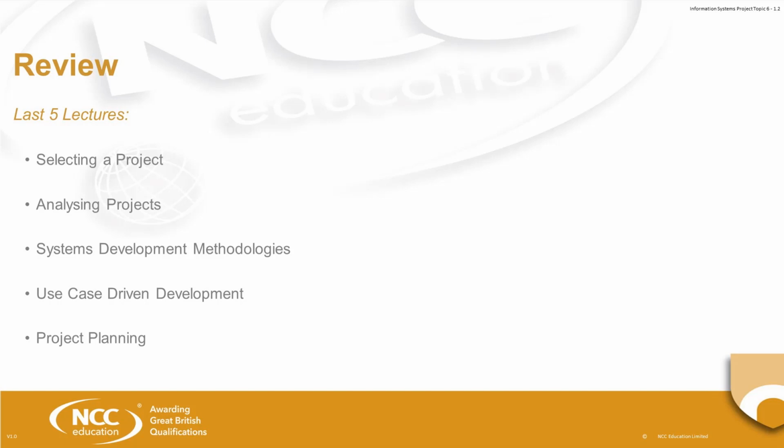Then topic 5 dealt with project planning. So we take the tasks that are included in the use case driven development, we take research tasks, we take all the reports that you've got to produce as part of your project, and we count those all as part of the work to be done to complete the project. And we've dealt there with creating a work breakdown structure so that you can analyse those tasks in more detail to get a full understanding of what it is that you need to do in order to finish this project.